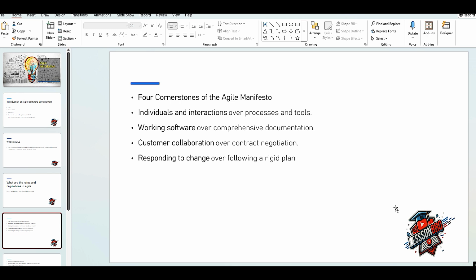Now in Agile, we first concentrate on the best features you need. So we go cycle by cycle, concentrating on the nearest or best feature to go to market. If you take an e-commerce application, the most important thing first is the login page, after the login page the e-cart, and after the e-cart the payments. These are all the basic things. So start building feature by feature, so that at the end of the day the goal is a working application. And then customer collaboration over contract negotiation.